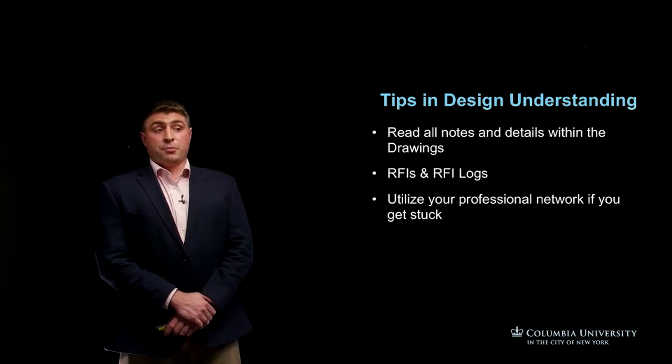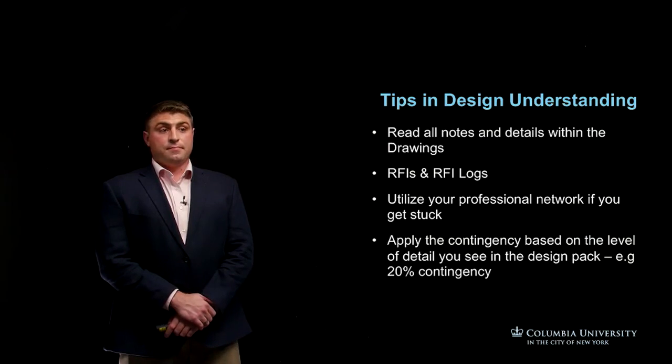You can also utilize your professional network if you happen to get stuck on a particular topic. Finally, please make sure to apply contingency based on the level of detail you see within the design pack. An example would be 20% contingency to your overall price.